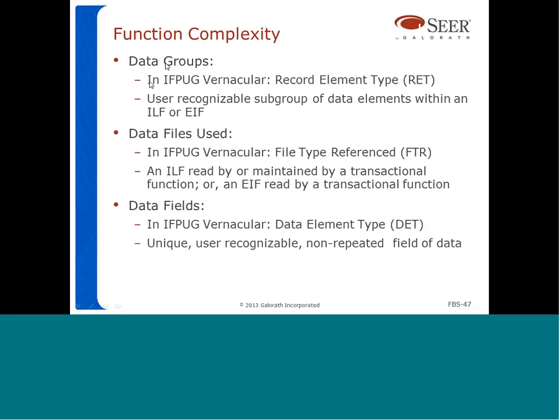So again, data groups: the standard name from IFPUG is a record element type. In a few words, a data group is a user recognizable subgroup of data elements within an ILF or an EIF. So it's basically a subgroup of data.